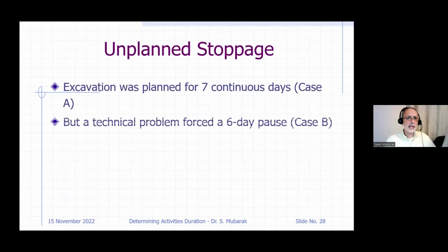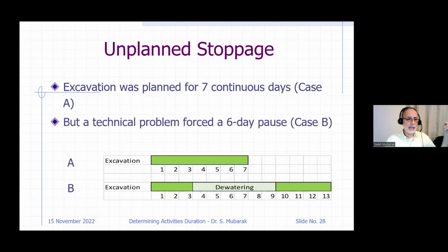Sometimes there is unplanned stoppage. You're doing an excavation and all of a sudden there is underground water. You have to stop several days until you pump all that water. You do dewatering.